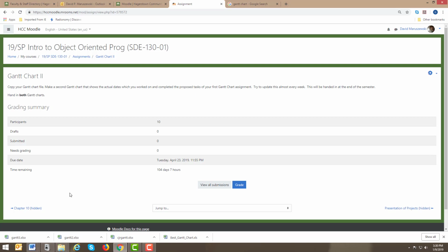It isn't necessarily that the original Gantt chart was wrong. It was more a function of when we were reasonably or actually going to be able to get this work done. So we might have actually approximated the amount of man hours correctly, but we didn't allot the correct times or days to do it.